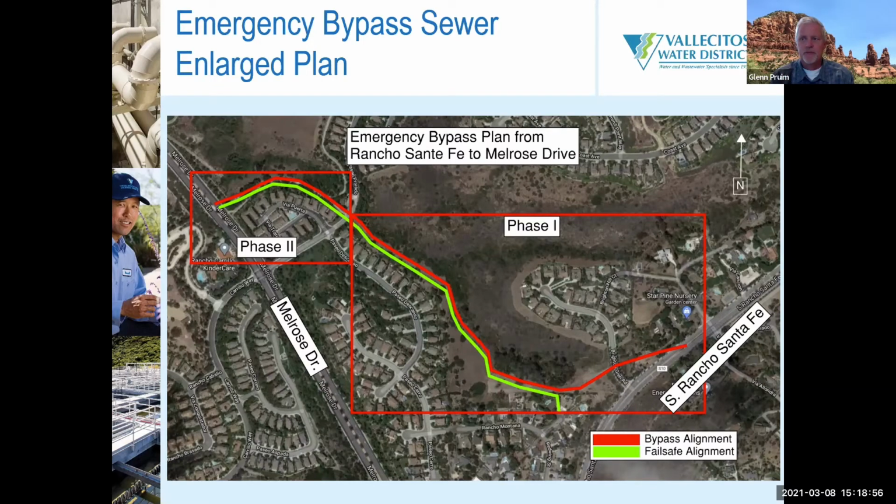No, thank you for following up on that. As part of our feasibility study, it provides a scale of economy, value savings by doing both at the same time, because the large majority of the cost of completing this project in construction is the mobilization and the setup, the excavation and shoring and backfill and compaction. So the fact that these lines are right next to each other.